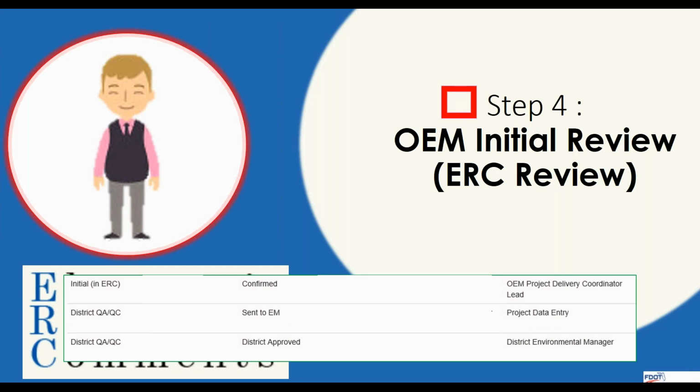The PDC is going to confirm the EDS form for initial review. They have a 14-day window from the time the document was submitted in SWEPT to approve it. It usually only takes 1 to 2 days.